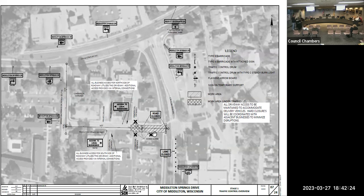That's a difficult intersection, and it's up hopefully for some redesign in a few years when a joint project between the city and the county is going to repave Century Avenue from Parmenter Street to the city limits, I think. Is that right, John? Yeah, I think that's currently scheduled now. Well, it's in the draft five-year plan for scheduling in 2026. So that won't give you any immediate relief, but hopefully when that intersection gets improved, something will provide some relief for everybody.